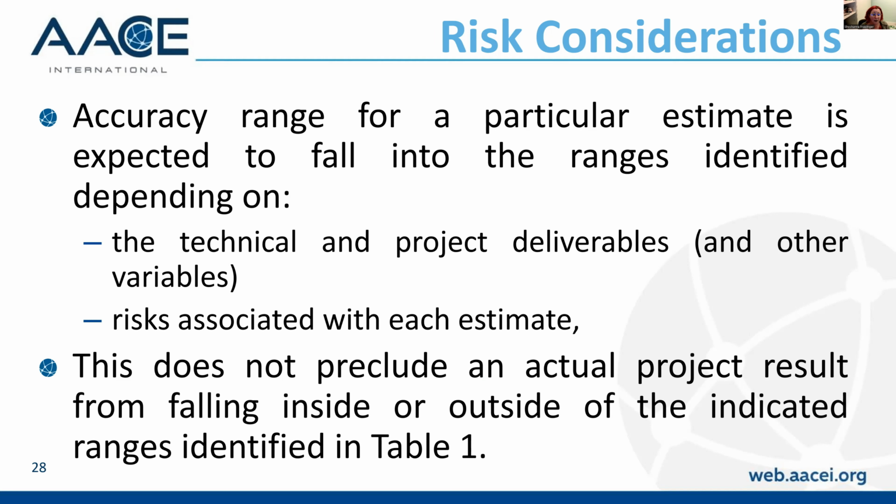If we are doing a rinse and repeat of series of scopes where the technology is the same, it's well understood, then obviously you're going to be well under the accuracy range depicted versus something that is brand spanking new.